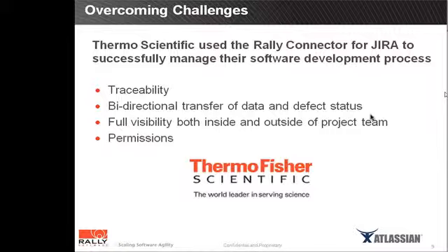The software core team periodically reviews the defects in JIRA and identifies which ones need to be quickly addressed by checking a checkbox in the defect view in JIRA. The JIRA connector periodically sweeps through the defects and copies the defect description and other attributes into the backlog of the appropriate project in Rally. At that point, the project team assigns the defect to a developer and an iteration and changes its state to indicate that it is being addressed.